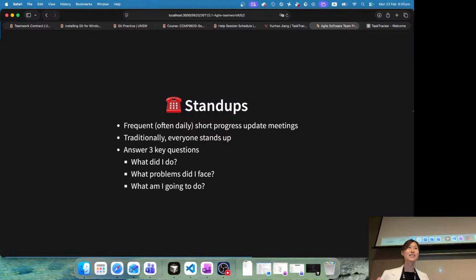And in the stand-ups, you answer 3 questions. What did I do? What problems did I face? What am I going to do? Why is this important? Make sure everyone's on the same page. Yes, that's one reason. Another reason? Why is this important? Why do we need to do that? And we do it every day.